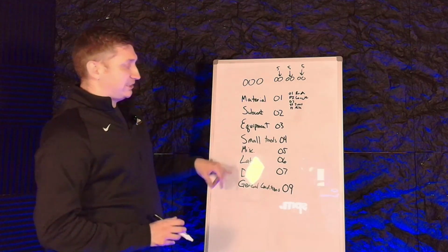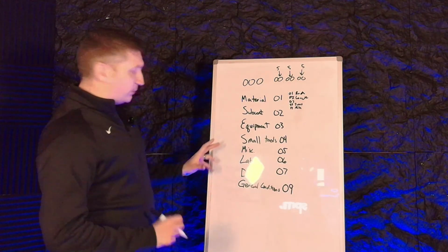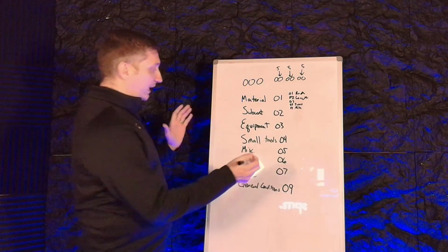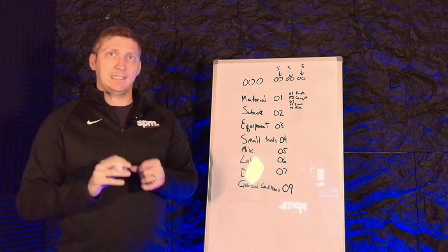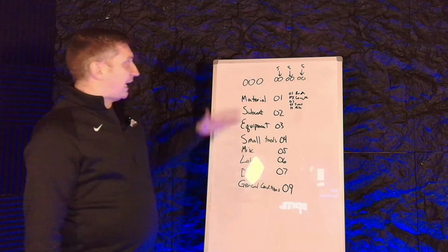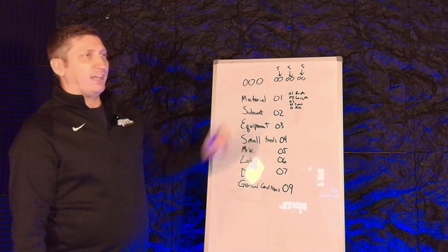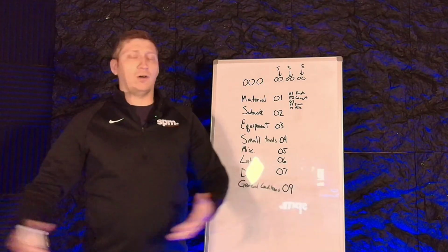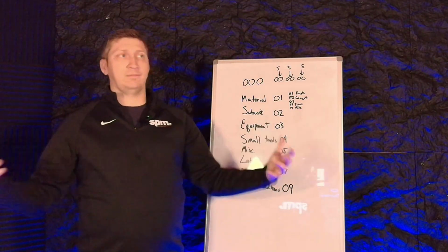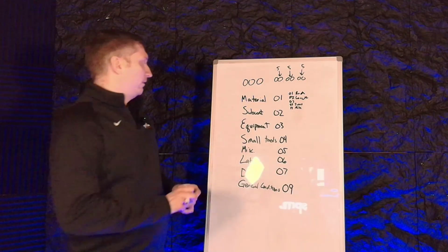And what it does is it shows you exactly off of your estimating. And I'm going to show you in the next video how you align these numbers exactly into your estimating process. Because it doesn't do you any good to track material this way if you don't do takeoff that way. You just say, oh, I think it's about this much overall for all the aggregate, all of the lump sum something, all the pipe, for example.